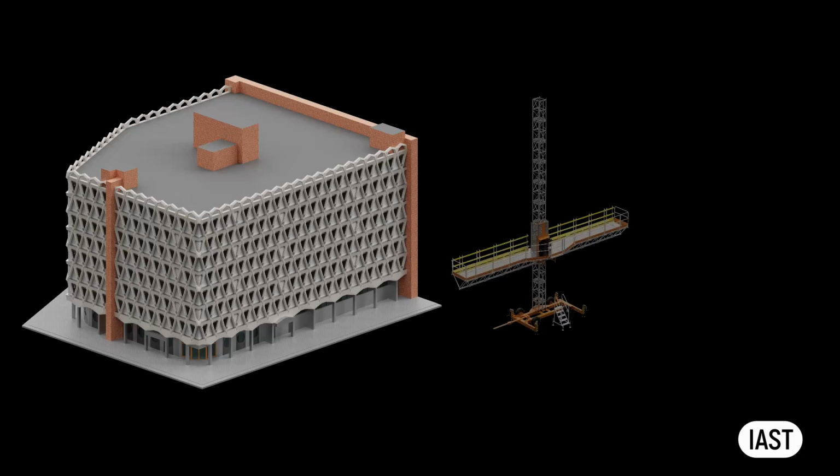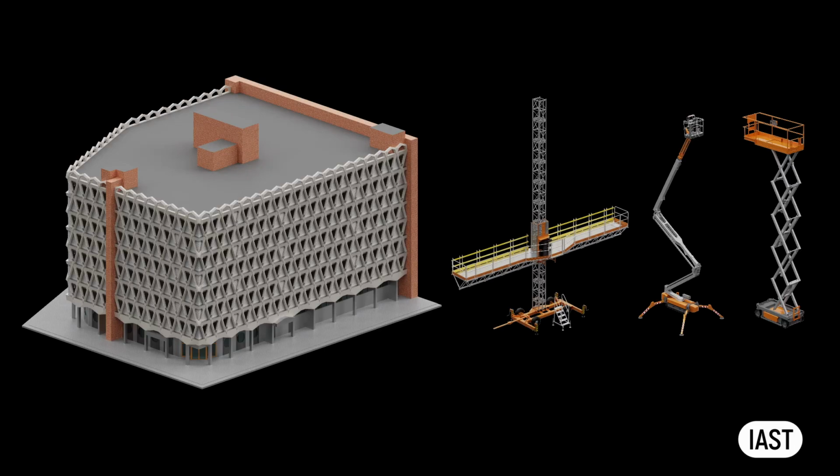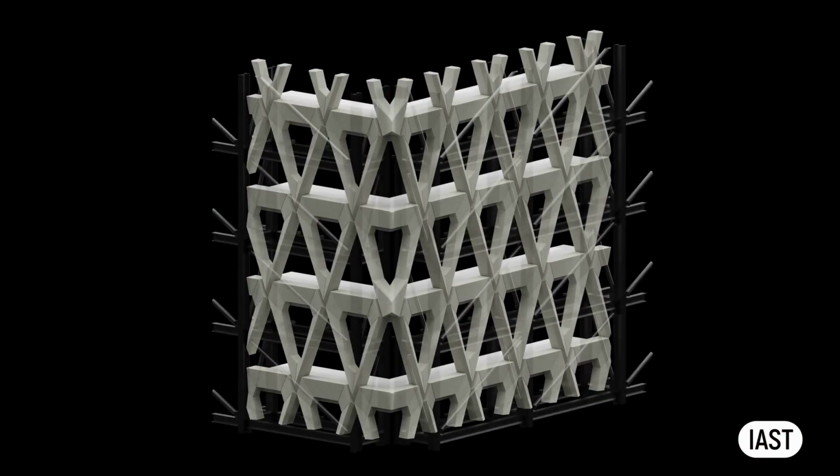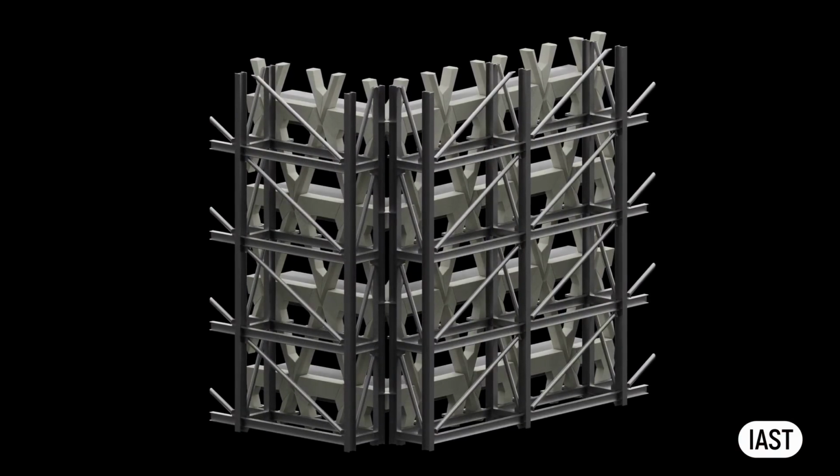Access for construction is one of the main drivers for selecting the facade system for the project. In the case of this project, the choice of access for construction is severely limited by the fact that the existing facade is retained. Let's review what access for construction is required for all 4 redevelopment options.